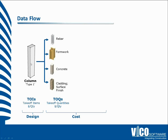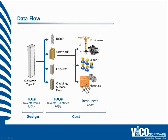This layer really represents tasks or the methods. We subdivide those into the labor, equipment, and material that you have to purchase to build that object. This content is highly reusable — on every project you're probably going to have concrete columns. The formulas may vary a little bit for the rebar, and the cladding will vary according to the design, but for the most part, once you have the content, it's highly reusable and it makes it much faster to produce an estimate.